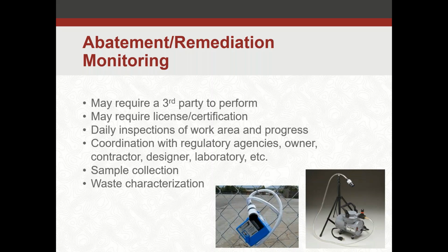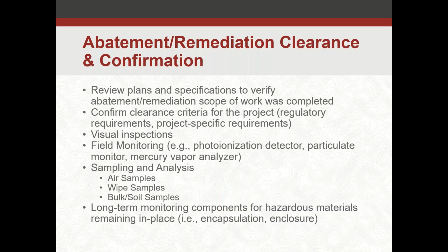When you do the monitoring, you're looking at daily inspections of a work area and how that progresses, making sure the routine work is being done as specified or in accordance with regulations. Coordinate with the regulatory agencies, owner, contractor, designer, and laboratory, and make sure everyone's apprised of what's going on. If there are any discrepancies or issues, bring them to someone's attention so they can be taken care of in a steadfast manner. For sample collection and waste, sometimes waste characterization will be done by the monitoring firm before disposal is completed.